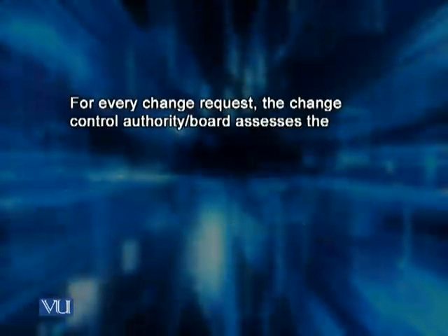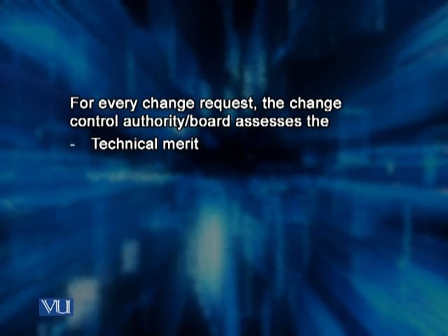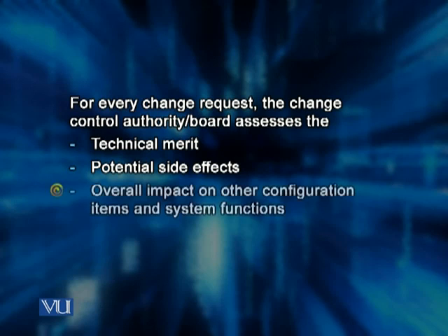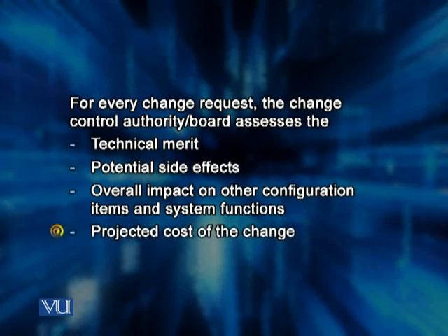And whenever a change request is sent to the configuration control board, this board or authority assesses the change request on technical merit, on potential side effects, on overall impact on other configuration items and system functions, and it will also determine the projected cost of the change.